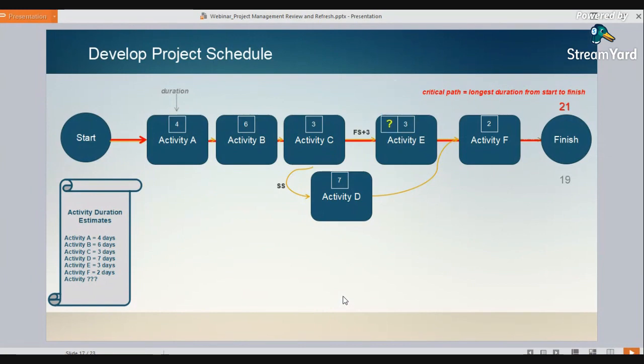It's still not a schedule. What if the person working on activity E says, well, I'm very busy. I got a lot of things in my hopper. When should I expect to be called on site to perform my activity? Well, just looking at the durations and the precedence diagram, you don't know that. So you got to start with our forward pass.